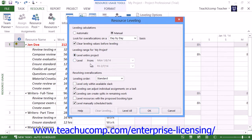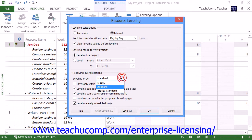Otherwise, you can use the From and To dropdowns to select the range within the project file to inspect. You next choose the guidelines to use for leveling from the choices shown in the Resolving Over-Allocation section of the Resource Leveling dialog box. For most projects, ensure that the standard choice is selected from the Leveling Order dropdown. This resource leveling method respects the task relationships between the tasks in your project file and is therefore the most commonly used.